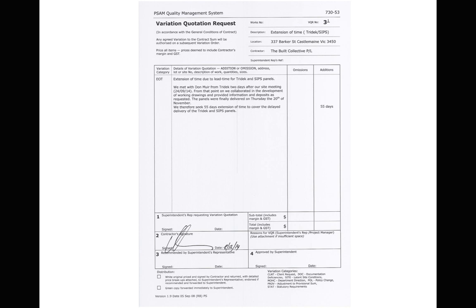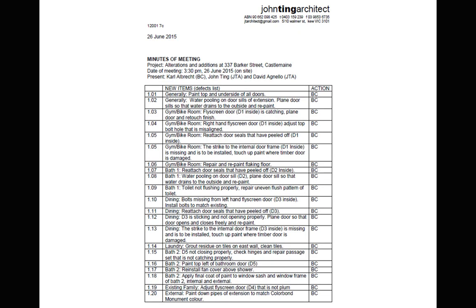Once the project was pretty much complete, the builder had completed this work. We did a final inspection to make sure everything worked and was not defective. There's always something that's going to go wrong, because these are complicated processes. And according to the contract, he has to come back and fix things within a certain amount of time. So before the final, or during the assessment of the final invoice, we do a big once over of the thing, so that everything is as perfect as it can be when the project is then handed back to the client.